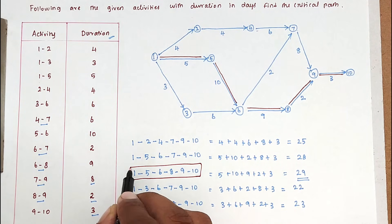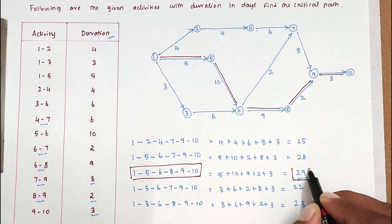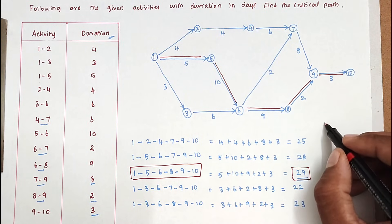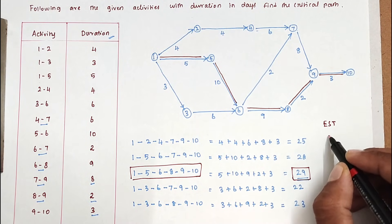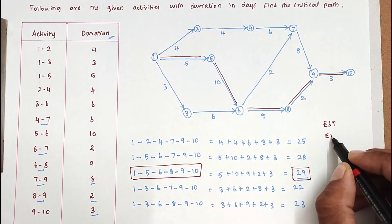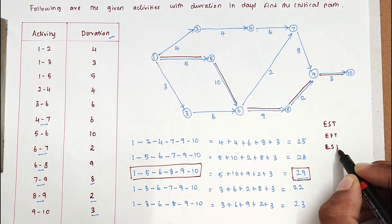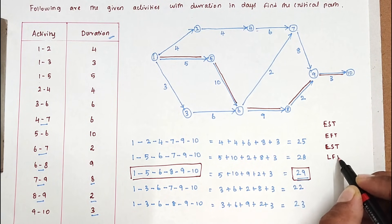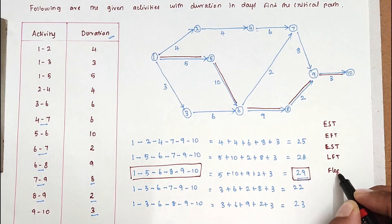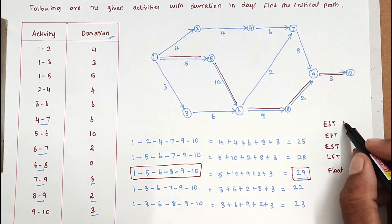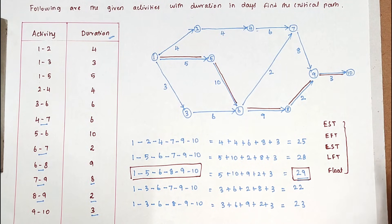So this is the critical path and 29 is the critical duration. Using this network diagram we can also calculate the Earliest Start Time (EST), Earliest Finish Time (EFT), Latest Start Time (LST), Latest Finish Time (LFT), and floats. We will see those calculations in the next video.